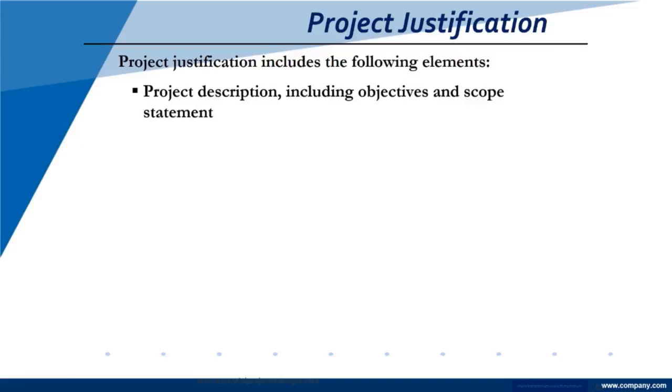I worked on a project where our scope statement was we want to deliver to the citizens of North Carolina the ability to pay their vehicle property tax when they register their car. That was it. And it had many parts, and I showed you that in the lecture on programs. There were 4 distinct pieces, but the statement, which is what I'm talking about here, was very succinct.